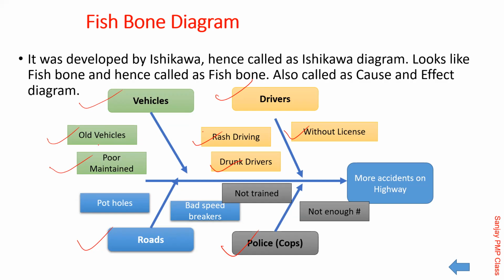So for example, why are we learning this particular fishbone diagram, or cause and effect diagram? It says that when you are investigating poor quality, it will not be just because of a lazy developer. It will always be a result of multiple things: a bad tool, less experienced developers. It could also be because of unclear specifications, so many things. While investigating, such a thing will be there. Wherever there is the word RCA, root cause analysis, you should be using this and drawing it,